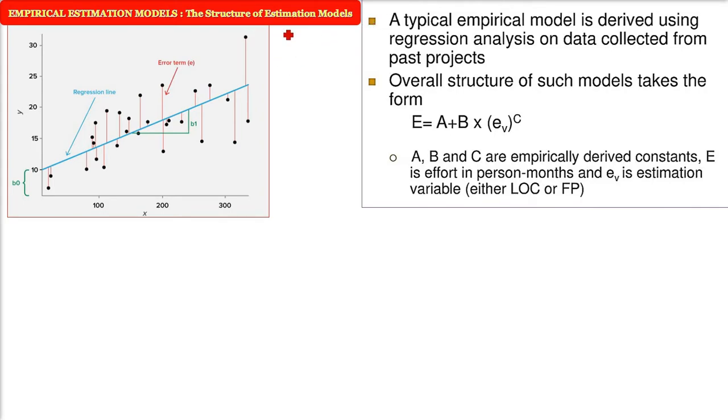Now, there are certain models which have been developed with respect to past projects, or the experience from the past data, and there is an equation. We have certain numbers here which are empirically derived, and these are the estimated expressions for time. You can compute the time, you can determine or estimate the effort, and also the dollar, that is the amount, the cost of the project.